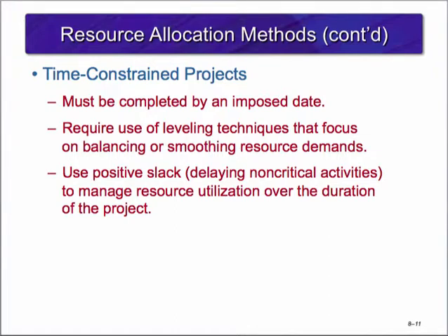It is difficult to manage a schedule when resource availability is erratic. Therefore, project managers typically resolve this by using resource leveling, a technique used to balance or smooth resource demand. Leveling basically delays non-critical activities, using slack to reduce peak demand.